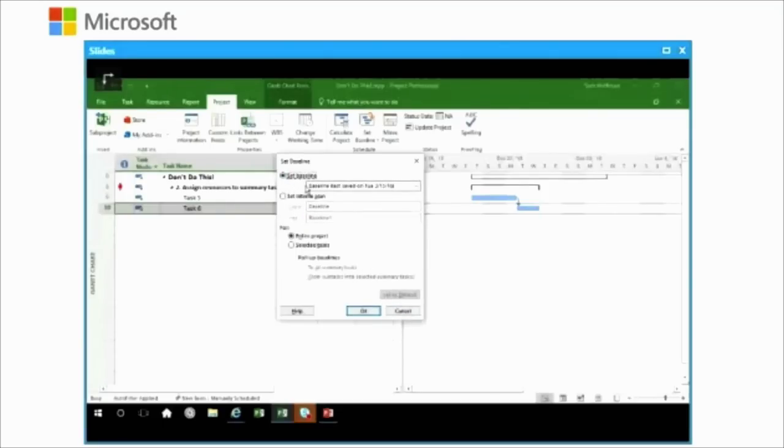In project, that means that this task can be delayed to December 31st, 2149, whereas a priority of 1,000 means do not level this activity, or if it's project-wide, do not level this project. Keep the dates exactly as it was planned. Priority is only used in leveling. It does not mean immediacy. It's for your convenience to control that expediency in the leveling of the project itself, the algorithm.